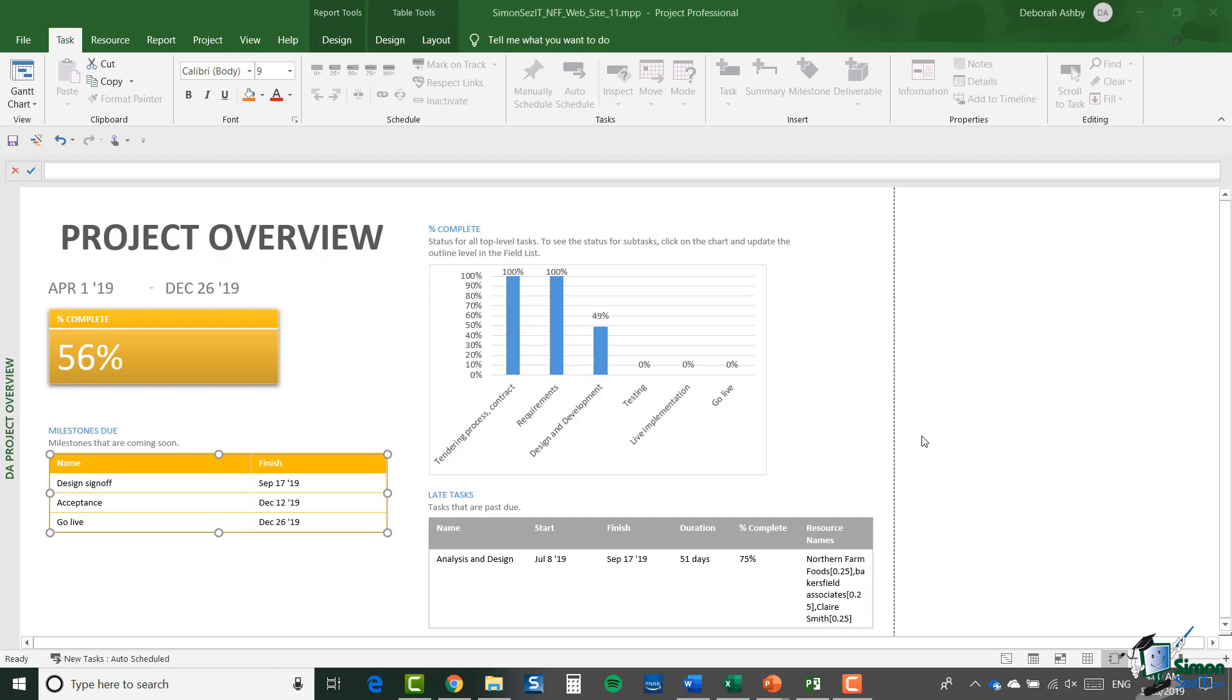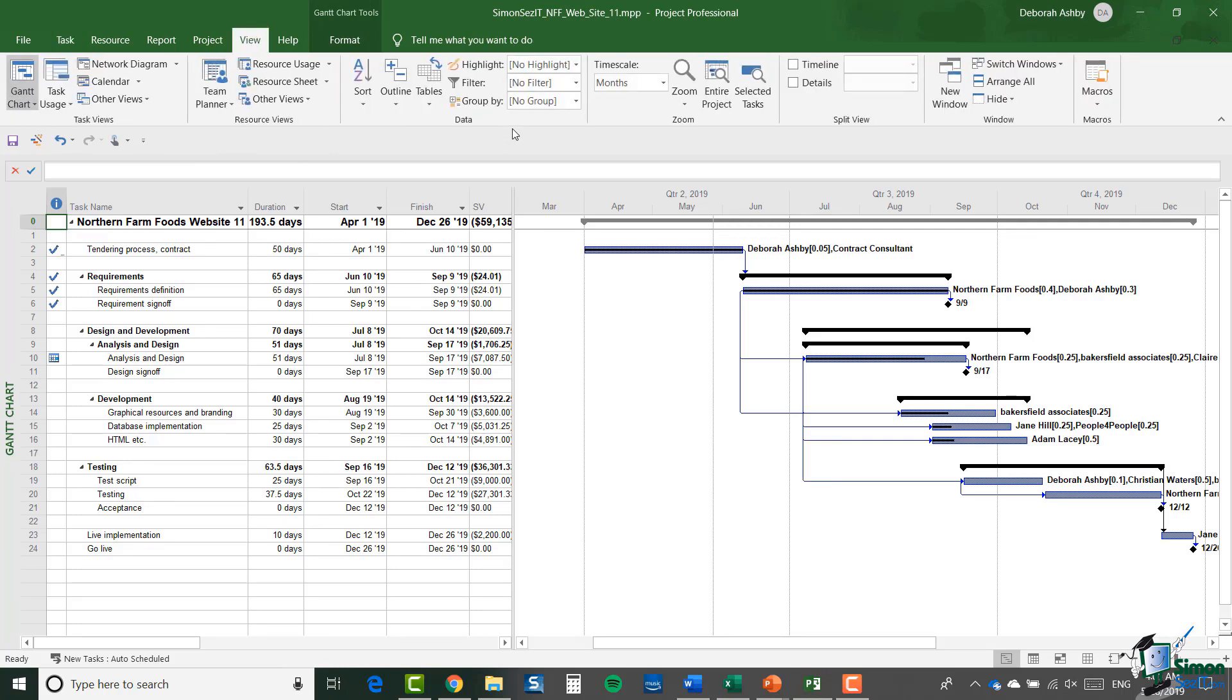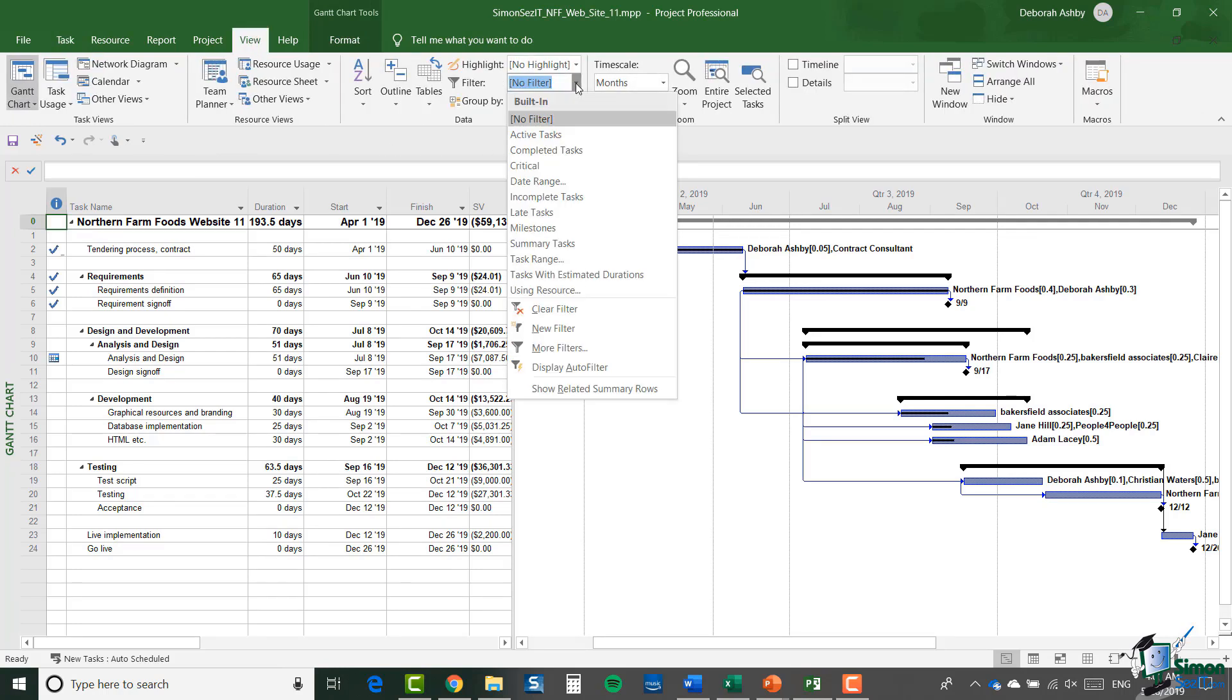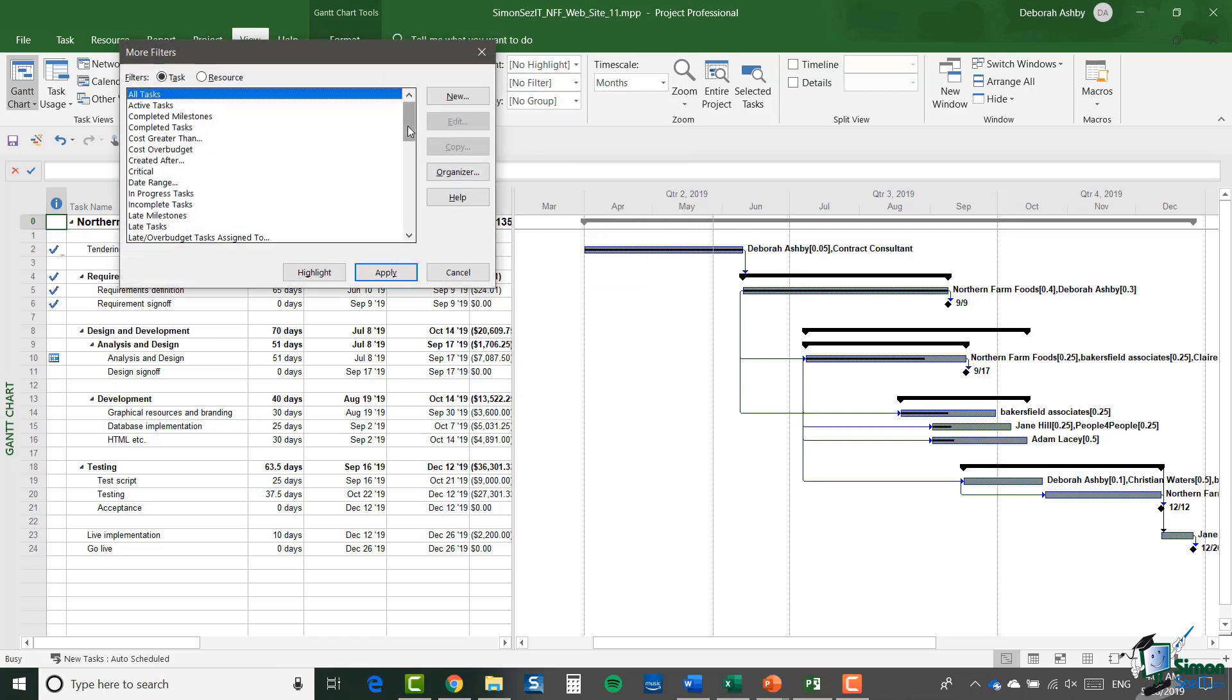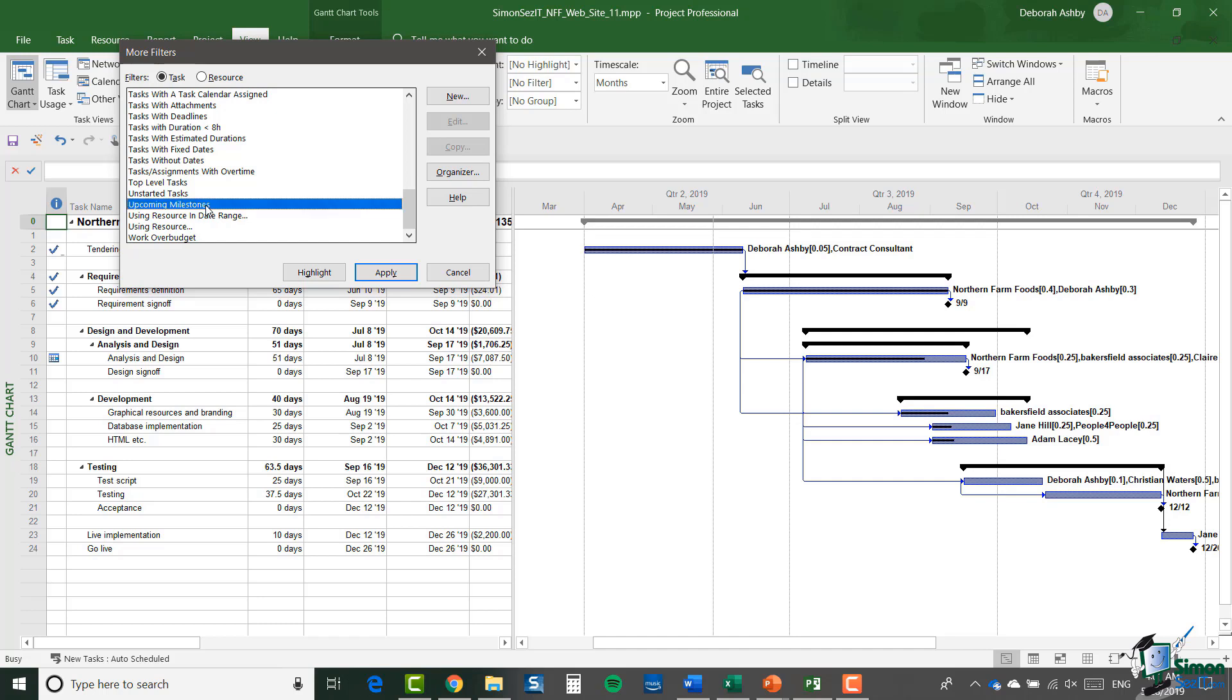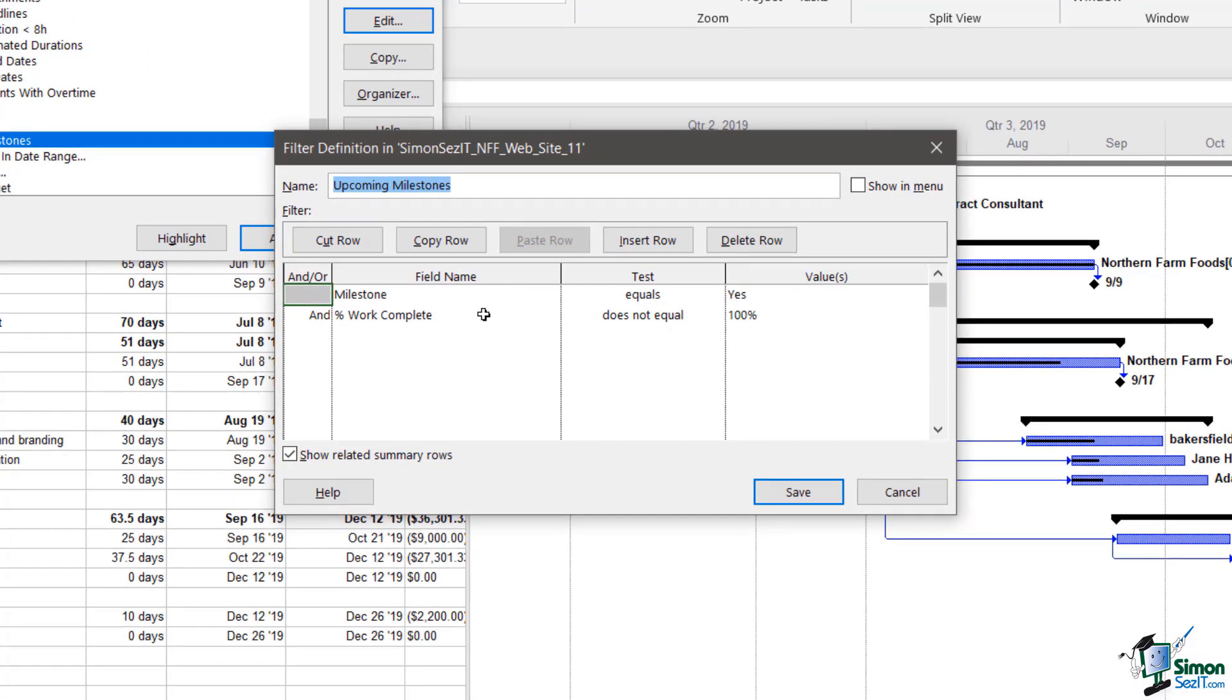Now you can't actually see directly from here what a filter does, but if you go back into Gantt chart view and go to the View tab and go to Filters and More Filters, and if you scroll all the way down to Upcoming Milestones and click on Edit, you can see that filter. The filter is made up of two conditions: first, milestones equals yes, and secondly, percent work complete isn't 100 percent. So we're looking for incomplete milestones. When it says upcoming, that doesn't mean within a certain period of time, that just means any incomplete milestones.